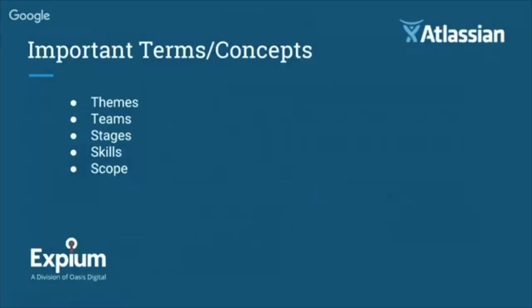Stages are what I just referred to. It's the life cycle of a work item. So in software development, it could be the design of a work item, rolls into the development. And then there's testing and documentation. And there might be a percentage of the work of the estimate that's assigned to each of those. Well, those stages of development or stages of work completion are built into JIRA Portfolio and allow you to automatically break that up and then understand where the skills are in your team.